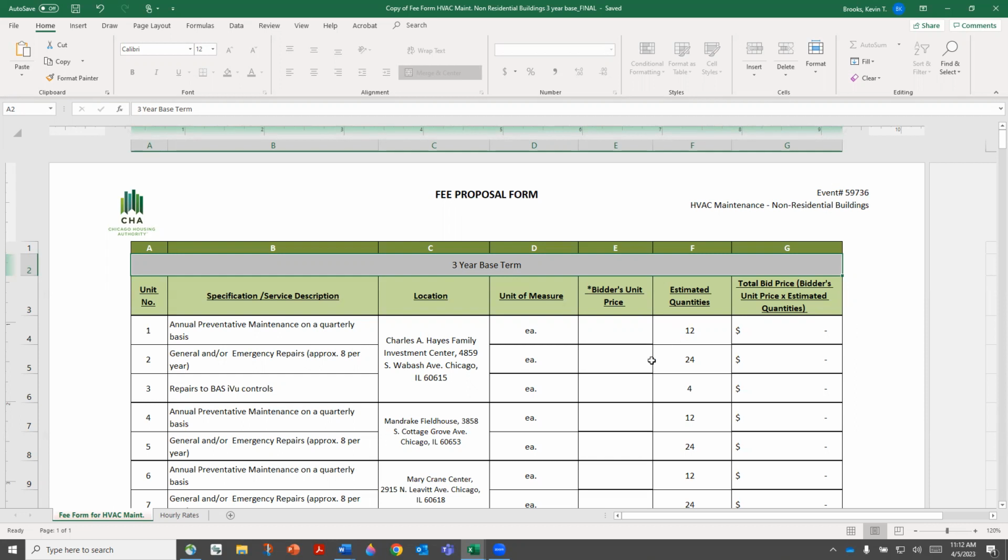And when you start looking at hourly rates, focus on making sure that you're not just looking at the hourly rate of your fastest man, but that you're taking into account who's going to be working on the project, and if there's multiple people that you would call out, getting a good average so that your hourly rate includes all the participants that will be doing the repairs.